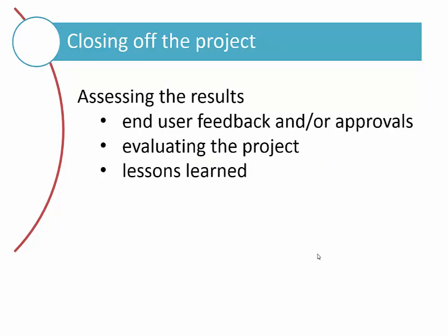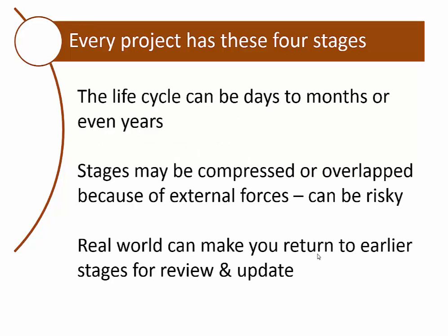And then at the end, we need to figure out how we stop that project. So we'll have feedback from anyone that's involved in it. If we were baking the bread for someone, they have to approve the loaf of bread and say, okay, that's a good enough loaf of bread for me. We might have to do a bit of reflection and evaluate the project. So how did we get on with the project? What did we learn from doing this project? Is there anything that we could do differently next time? And so on. So that's kind of the formal close-off of the project.